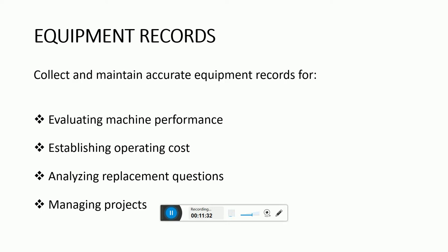Another important thing is the fuel expenses, like how much fuel it has spent and how much work it has done. The fuel amounts can be cross-checked against the total amount of fuel purchased. All these things can be combined and put into the analysis, which greatly increases the accuracy of the equipment cost analysis.